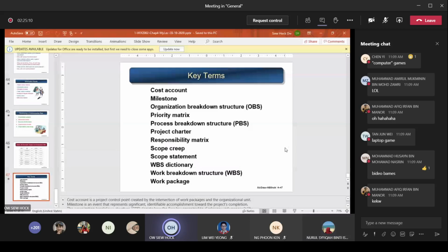If you don't want to send to me, it's okay, but you assign a team member to check. Because you see, this is the work breakdown structure. Somebody is assigned the task of designing the Google form. Then after designing, someone is going to go through and moderate the form. So you can have R, where R is, let's say, the person responsible for designing the form, and S is supporting, meaning I check the form. Okay or not? You know how to do now?